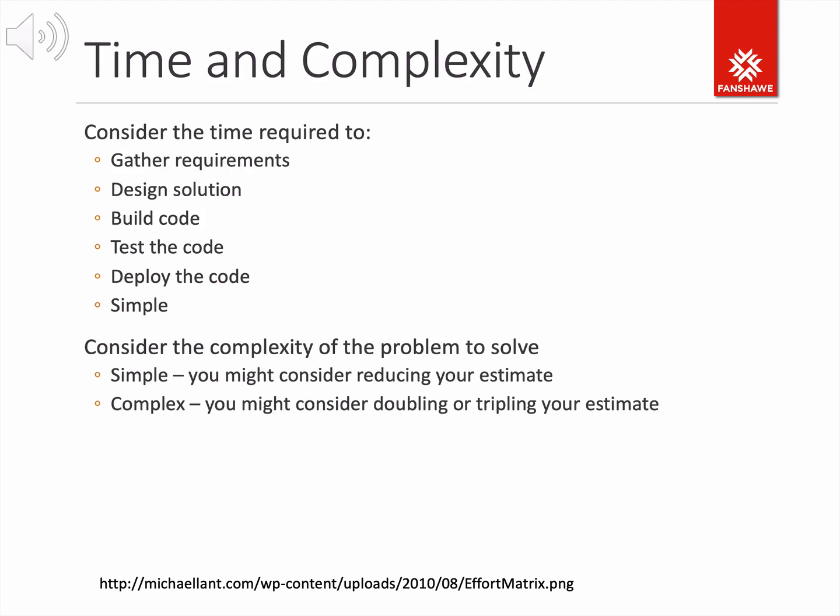You have to remember that we have to kind of plan this around the lowest common denominator. And so really, if we've got a complexity of 1, then anybody should be able to do it. But when the complexity starts going up, we have to start factoring in a little bit of extra time to do the work. And in fact, we might actually double the time. So if the home page has a few unknowns associated with it, and because of what we're doing it's going to be a little bit more complex, then again, we're going to probably double that estimate, and it won't really be a 1. Ultimately, we'll take this complexity factor and make it a 2.